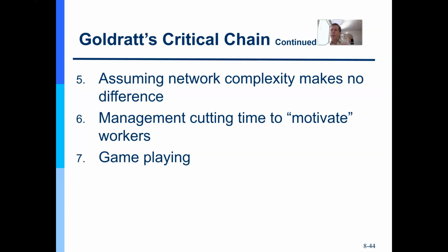but I'm not throwing away that other time. What I'm doing is I'm moving all those little times from each activity. So if one activity was 4 days, now it's 2. If it was 6 days, now it's 3. And I'm moving those 2 and 3 days, those extra, to the end of my project. And I'm going to manage that as the project manager.